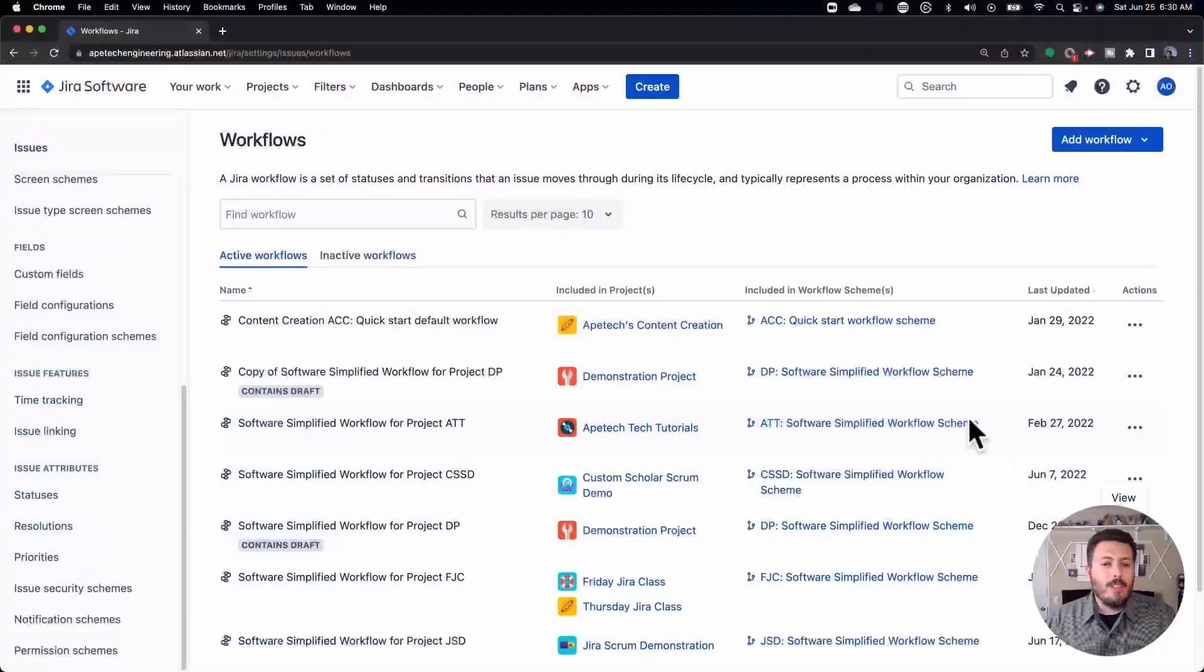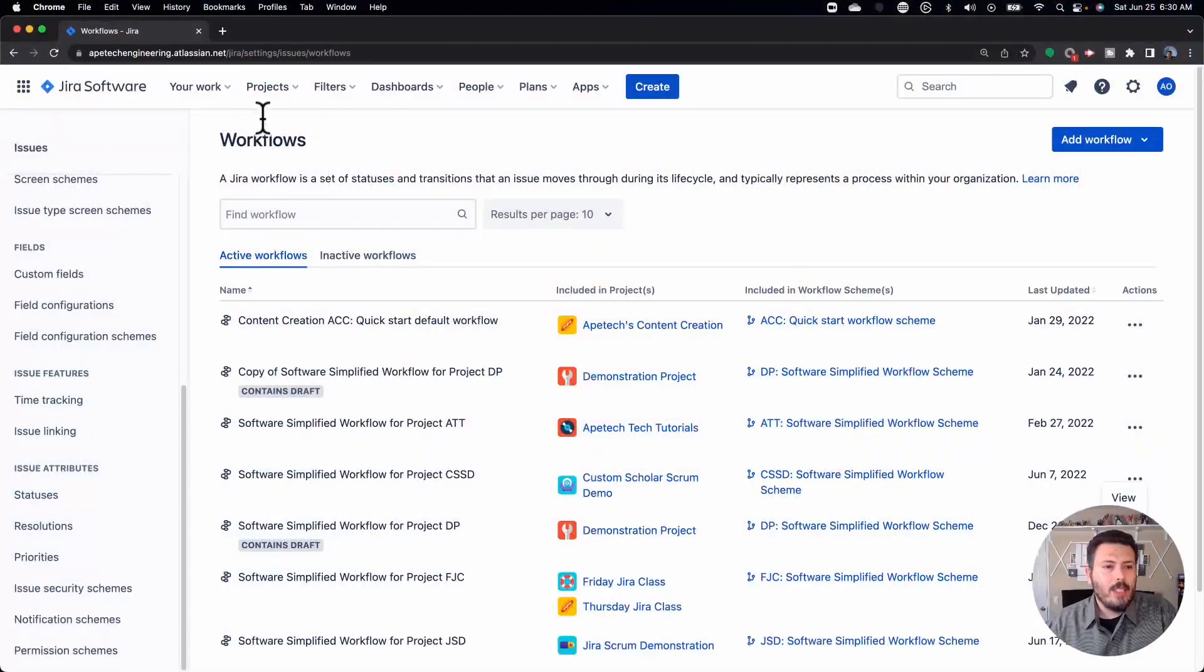So, let me show you what you should do and how you can do it. Now, I do want to preface this. So, in order to do this activity that I'm about to show you, basically using one project as a template, you do need to be in both projects. So, if you're a site administrator and you just inherently are in every project because you're a site admin, but you're not explicitly in the people section of the project, this will not work. So, you want to make sure that you are in the people section of the origin project, not so much the destination because you're about to create the destination, but in that origin project that you want to use as a template, you want to make sure you're in that project.